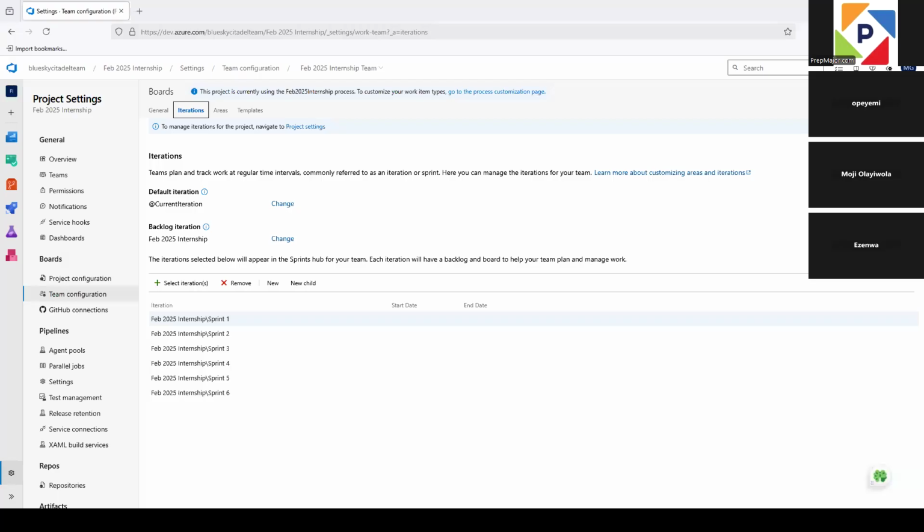And then you're wondering, okay, we started this sprint with 4 user stories and we're seeing 8 user stories. You're thinking, when did we agree to make it 8? You didn't agree to make it 8. It's because this default was not changed. So automatically it will just be adding things into your sprint.